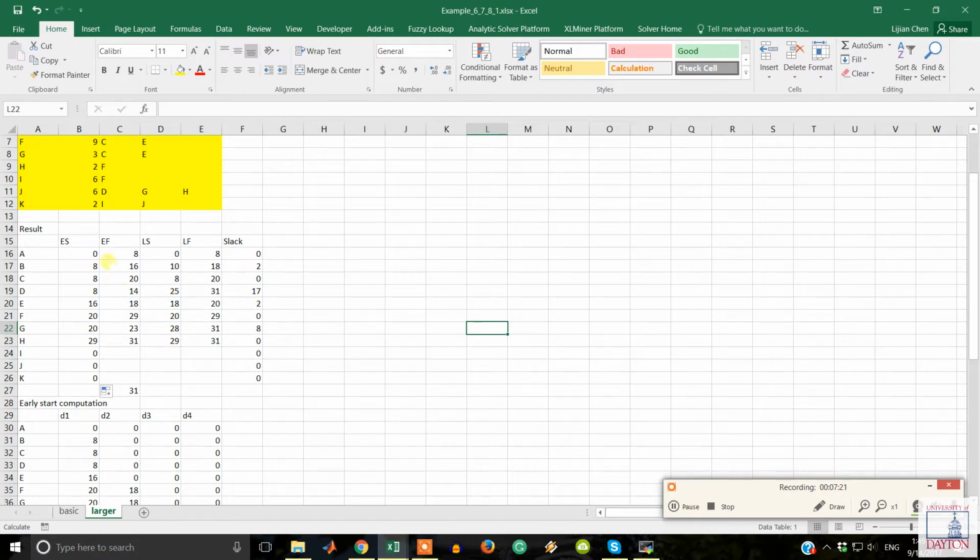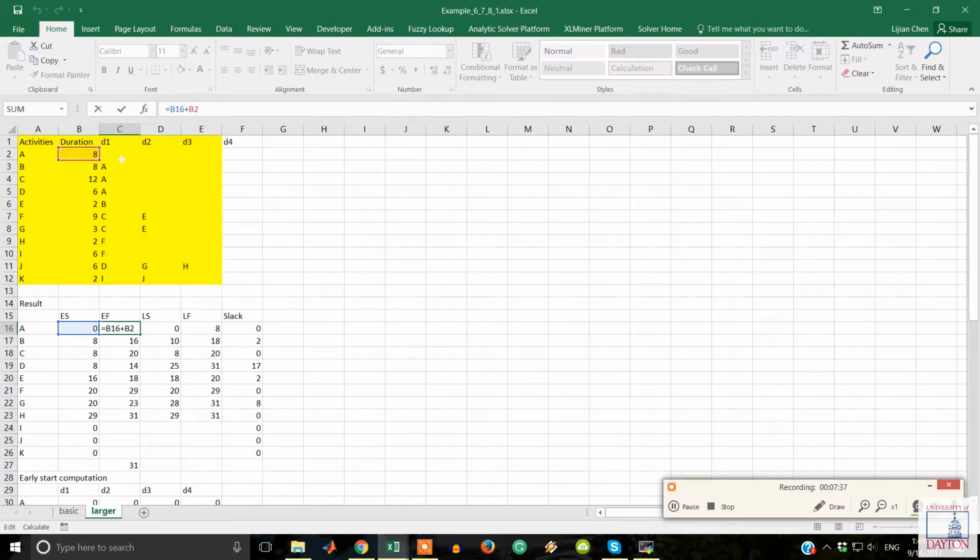So we may get 0. That's okay. Now for the early finish, it's basically the early start plus the duration. Okay, so we know what it is, and so we can drag it. All right, we have all the things ready.